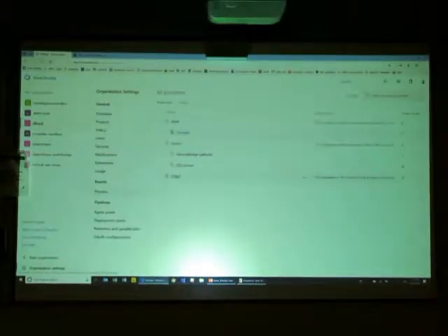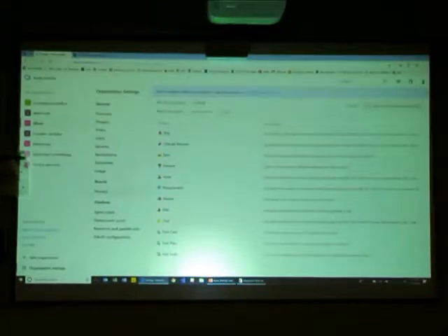Well, if you look at CMMI, it still has an epic, it still has a feature. Instead of a user story, it's called a requirement. It has a task, but it also has a risk, a review, an issue, and a change request. So it's got a little extra. If you want to do risk assessments, there's a risk, you can do that.